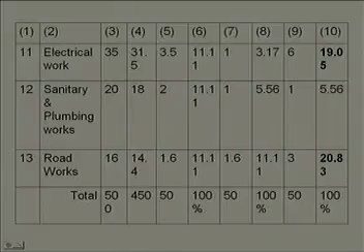In uniform loading, this 50 lakhs you will be getting throughout the project, whereas in front loading, a higher value of money you will be realizing right at the beginning of the project, whereas in back end loading, a higher value of money you will be realizing at a later date when the project is nearing completion. So, this part you have to understand very clearly.